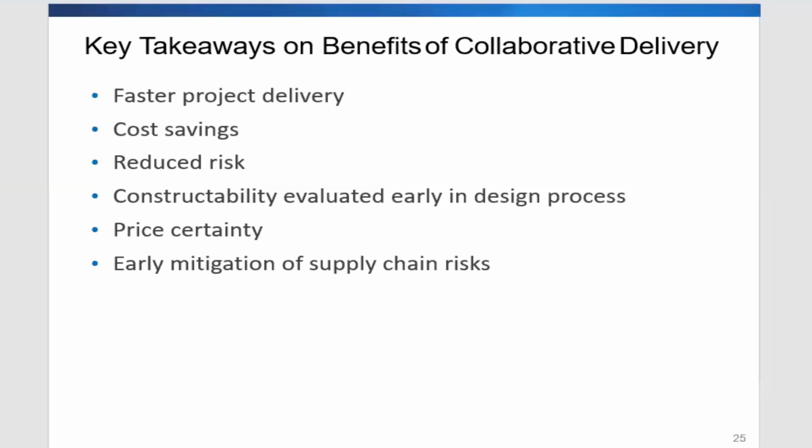And also, one important thing is constructability review. Earlier in the process, the contractor can come in and tell you whether this approach is constructible or not. Going back to the traditional approach, some of the contractors, even before they bid on the project, once they get the documents, can see right from the design that there's a mistake, and instead of pointing it out, they are not going to do that. They will just keep it to themselves.